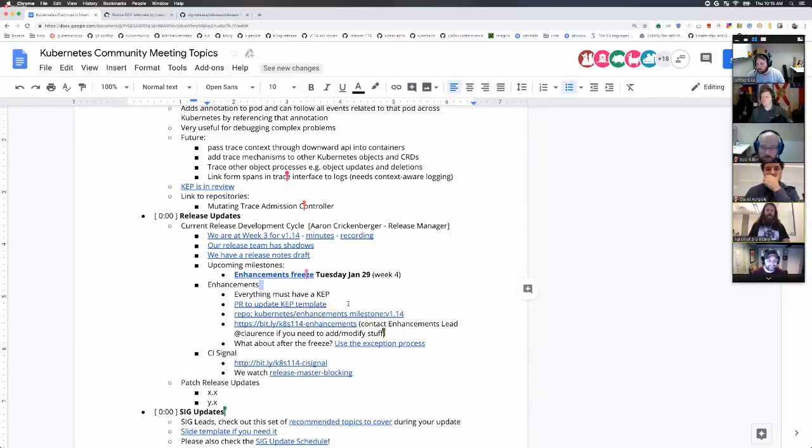We're going to be a little bit firmer on what's supposed to be in the KEPs and what they look like as we get closer to code freeze. If the KEPs are setting up the goalposts for you to kick your field goal through of shipping your enhancement, sorry, I'm terrible at analogies, then we want to make sure those goalposts don't move before code freeze, so we have a good idea of whether or not it makes sense to continue trying to land your code before code freeze, or maybe suggest that we should stop and focus on the stability of the code base prior to code freeze.